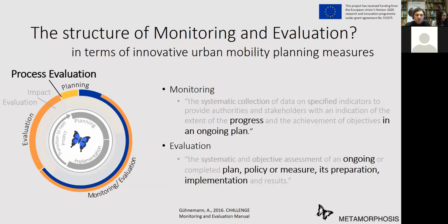And notice also that evaluation already starts parallel to monitoring, which is because there is a feedback cycle, let's say. The information that you get from the monitoring during the implementation of the project, you want to evaluate and then feed back into the implementation process. And that could mean, for example, in our coffee or tea case in the beginning, that we look at the progress and we ask the question, do we encounter barriers to adding sugar or milk?